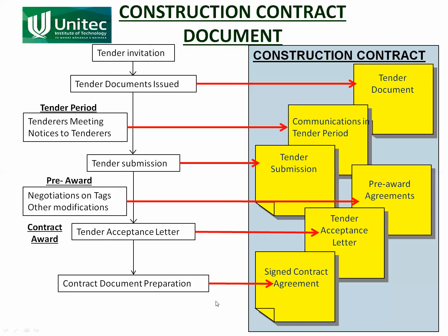But remember that the contract relationship is formed when the tender acceptance letter is received by the contractor, not when the contract is signed. All this does is just formalize that whole agreement. It's already in place when the tender acceptance letter is received.